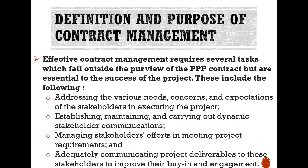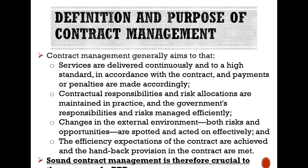Contract management generally aims to do the following: ensure services are delivered continuously and to a high standard in accordance with the contract and payment or penalties are made accordingly; contractual responsibilities and risk allocations are maintained in practice and the government's responsibility and risk managed efficiently; changes in the external environment — both risks and opportunities — are supported and acted on effectively; and the efficiency expectations of the contract are achieved and the earned-back provisions in the contract are met. Sound contract management is therefore crucial to the success of a PPP.